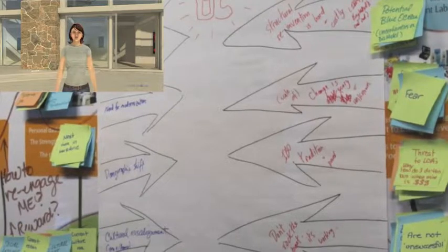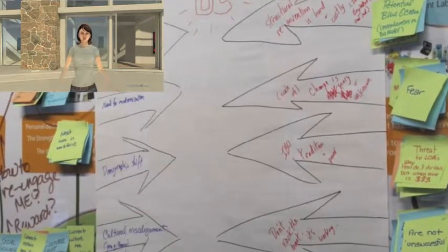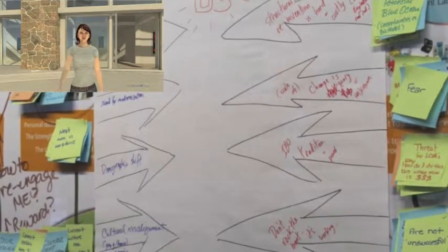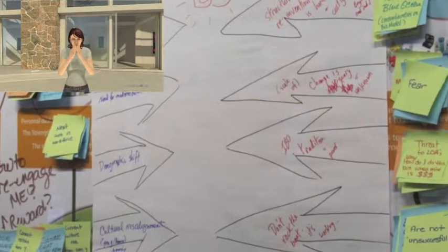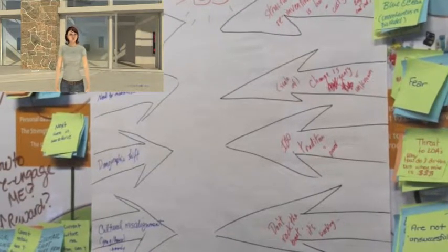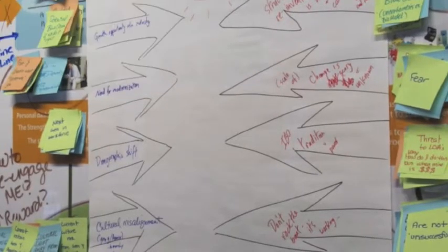After this, your team can decide how to minimize or remove restraining forces and how to strengthen the driving forces. Remember, minimize the restraining forces rather than increasing the driving forces, as change can be accomplished more readily this way. This is something that you want to do when practicing the four.